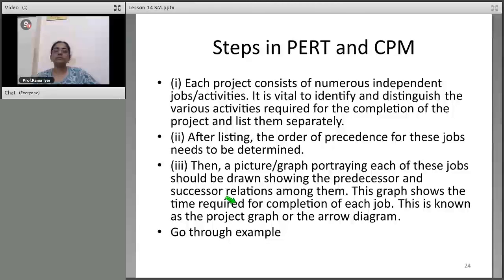So the 3 steps, if you take into account the graph which is given in your example and the graph down below that. First, A is going to take you 14 days to do. Okay. Then B and C go on simultaneously, right? Because they are independent of each other. So B will go on for 10 days, C will go on for 7 days, and then D will have to be done for both. That will go on for 4 days.